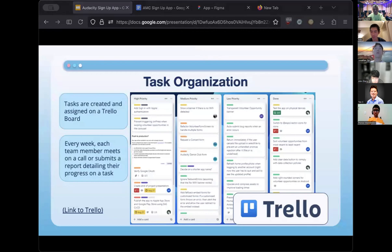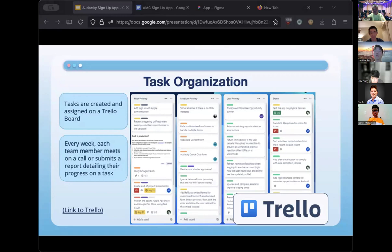Moving on to our workflow — it was centered around a task board on Trello. We had multiple columns where we organized tasks based on priority: high, medium, and low. Once tasks were finished, we would move them to 'done.' Each task had tags to help us categorize them. Tasks were assigned after weekly meetings, and progress reports were made weekly — at the end of each week we would all update the progress on our tasks, whether we needed more time or were already finished.